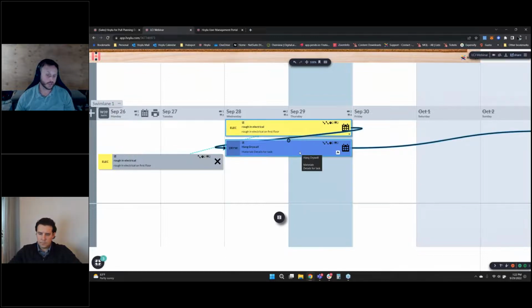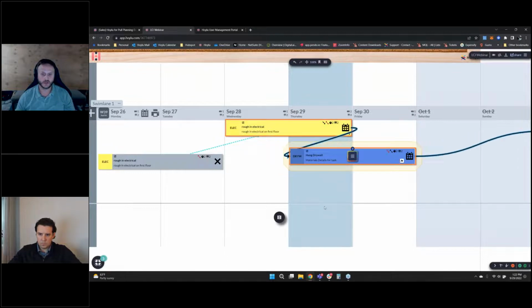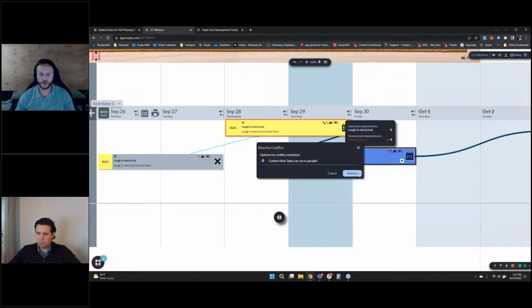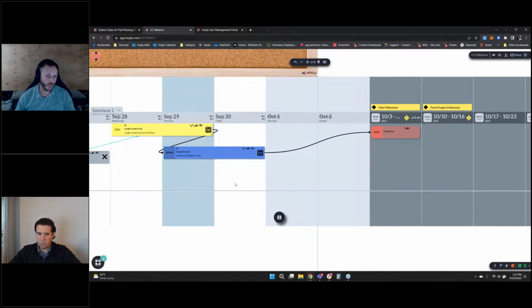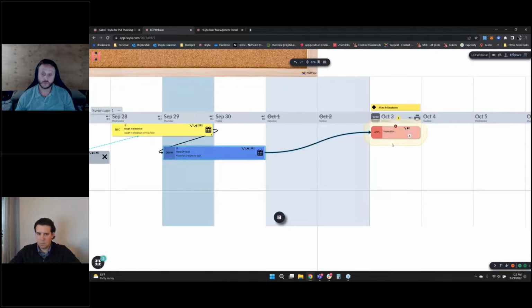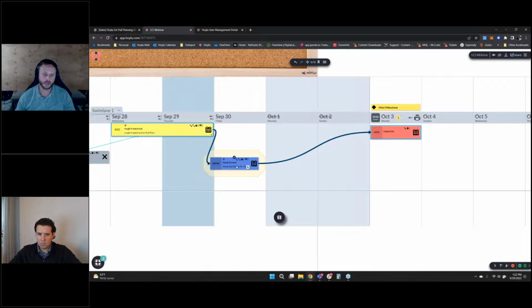Same thing if we had a lag too, right? If we had a lag, same thing. I'd go in and I would mark that as okay. But let's say that Ryan needed 2 full days. We couldn't overlap at all. No lag was acceptable. So what I could do there is I will take this drywall task and I'll move it to Friday, and then it'll spill into the following week.